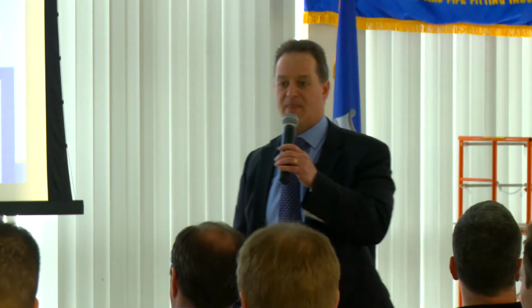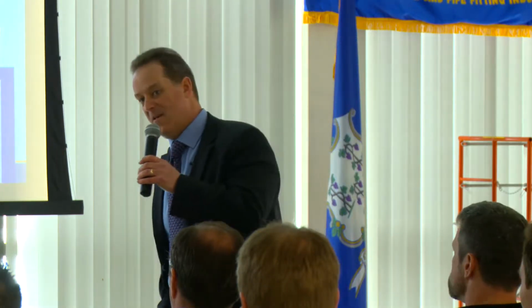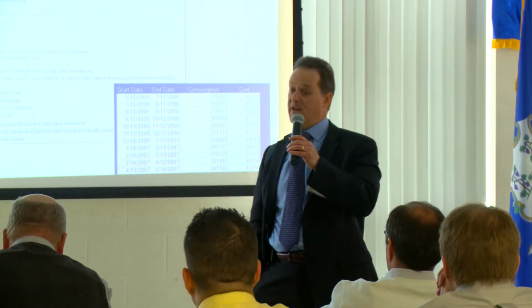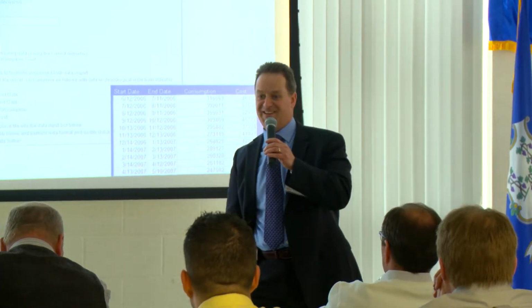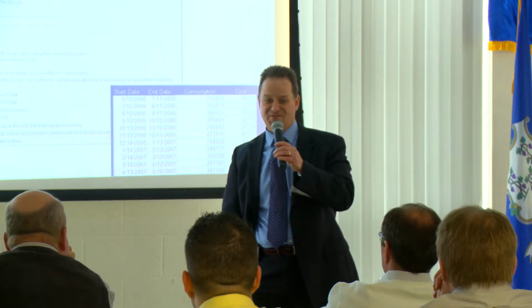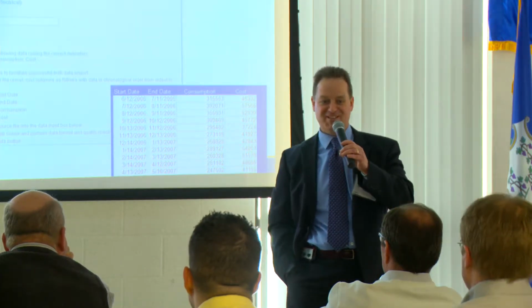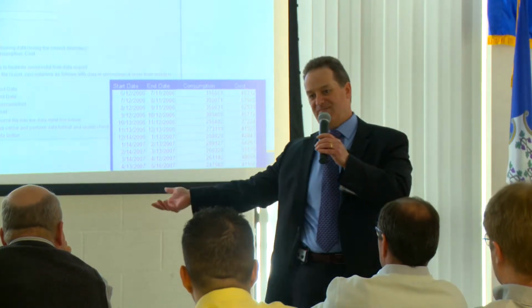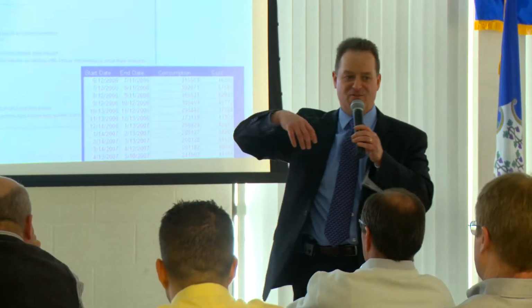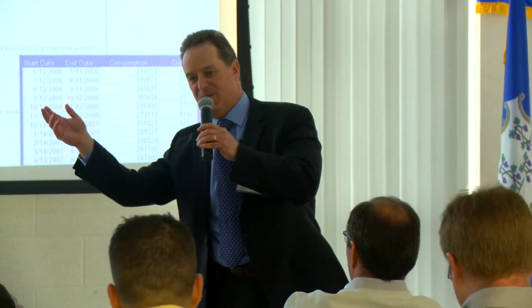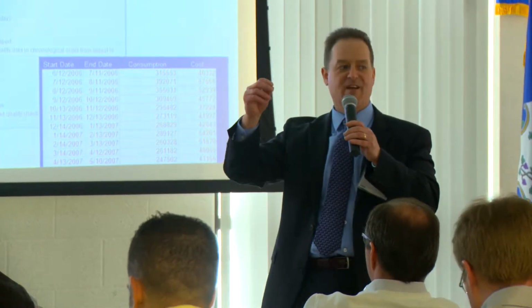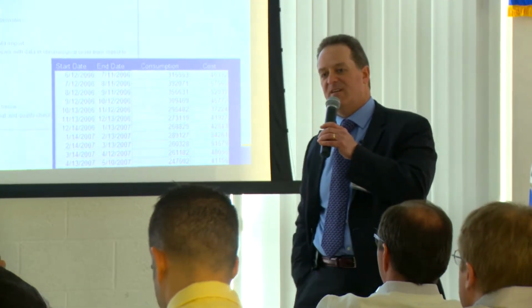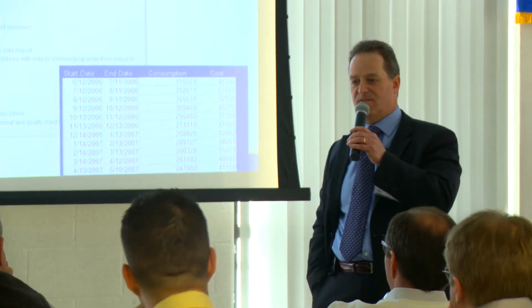Would the equipment needed to do the M&V for 5 years be included in cost? Yes, it can be, yeah. Again, with the caveat, you still have to make the SIR, right? So everything's in play as long as the SIR works, right? If not, that may have to be a cost out of bounds, or the owner could maybe dial back the M&V period, right? There's some variables around that in the conversation and closing with the building owner, you'll come to an agreement, a meeting of the minds of the stakeholders.